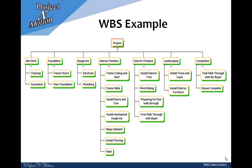Let's look at an example to see what we have learned. It is a graphical representation of a project plan for building a house. At level 1 we have the project title itself. At level 2 it is divided into seven phases: 1.1 is site work, 1.2 is the foundation, 1.3 is rough ins, 1.4 is interior finishes, 1.5 is exterior finishes, 1.6 is landscaping, and 1.7 is the completion phase. These phases are further divided into work packages at level 3, which is the last level in this WBS. All items in level 3 are work packages responsible for outcomes that contribute towards the completion of the house.